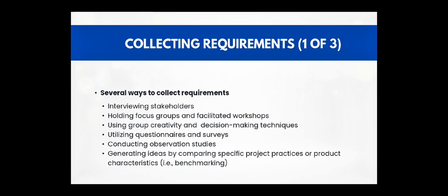The second step in project scope management is often the most difficult: collecting requirements. A major consequence of not defining requirements well is rework, which can consume up to half of project costs, especially for software development projects. There are several ways to collect requirements.